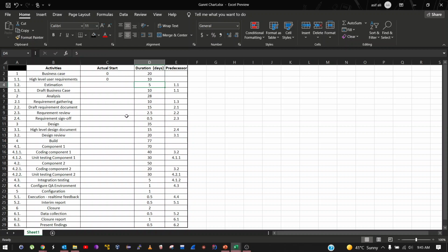Sorry, it was not business case, it was high-level user requirements. So the estimation cannot start unless high-level user requirements has finished. So we are gonna type this to be 0 plus its duration. It makes it 10, so it can start at 10 only.